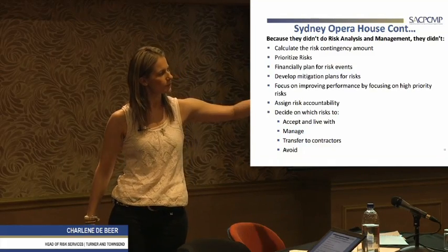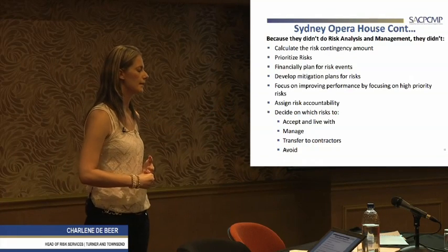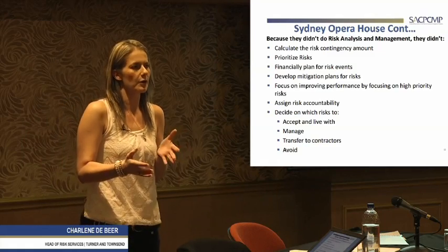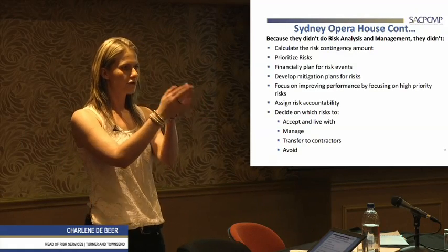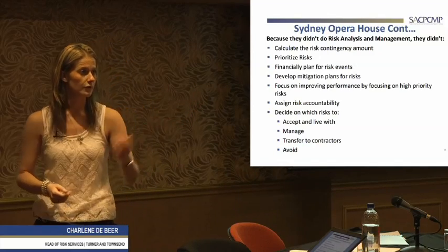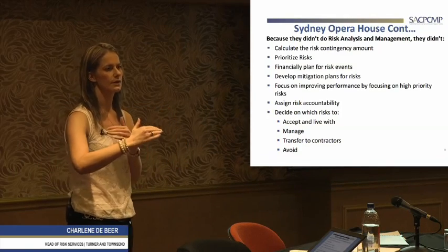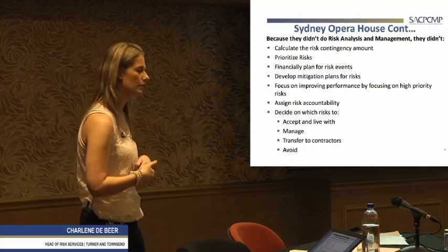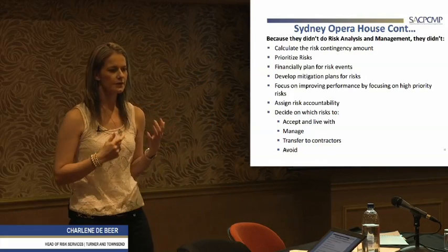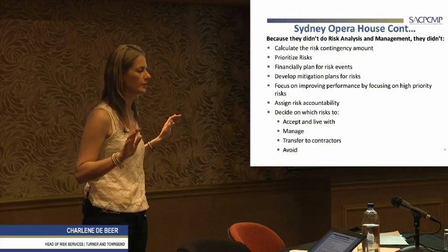So they can pull the performance bond, whatever retention they have, but still in commercials, it's capped at a certain value. And that's also what we usually do from a risk point of view, is look at what is the exposure. Did the client and the contractor, how did they protect themselves in a contract environment? Because that's very true. There are certain things that they have at their disposal, but it's also only to a certain extent, and depends on what contract it is, whether it's FIDIC, NEC. So it's not just that easy to always think, if you're the client, on the client side, just to transfer it, you're going to be fine.